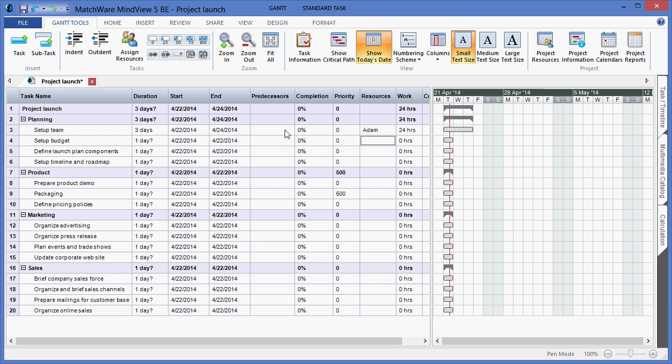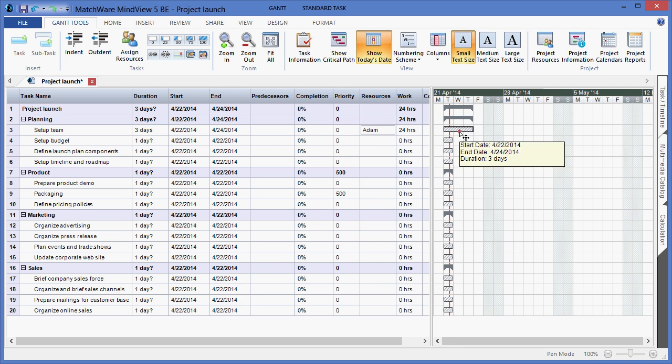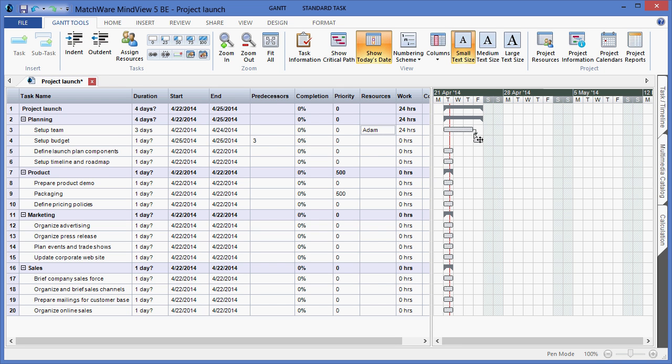If I need to define a dependent relationship or a predecessor between tasks, I can choose to left click on the duration bar, pull straight down, and drag and drop the line to the corresponding task. I have now created a finish to start dependency between tasks 3 and 4.